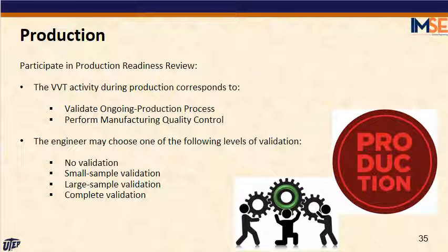The production phase. The production phase includes a production readiness review. During this review, it needs to be tested whether the manufactured products, subsystems, and end systems created in early pilot runs meet all their specifications within a stable, statistically quality control process. During this process, it is important to keep certain risks and issues in mind, such as integration, system, logic, production engineering, quality assurance, and safety.